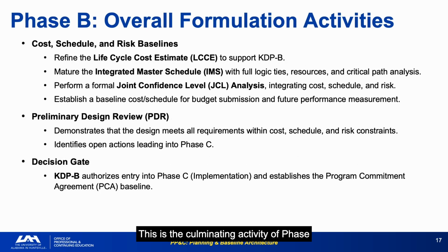This is the culminating activity of Phase B, the Joint Confidence Level Analysis, which mathematically integrates your cost estimate, schedule, and risk register to determine the probability of mission success. The PDR gate is the most important milestone in the project's life. This is where you've spent 50 to 60% of your budget, and now you commit to cutting metal. Get this wrong, and you own it for the rest of the life cycle.